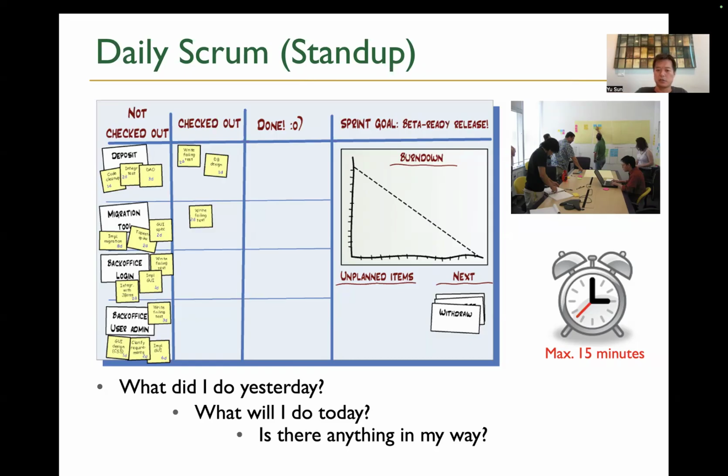Everyone just goes through 3 questions very concisely. What did I do yesterday? What will I do today? And is there anything in my way? Okay, so just answer 3 questions. You don't talk about anything else. Okay, that's how you do a Scrum meeting.